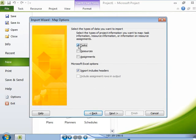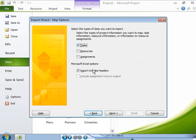You can choose to import or not import the header row in the Excel workbook by selecting or deselecting the import includes headers checkbox. By default, this checkbox is selected.